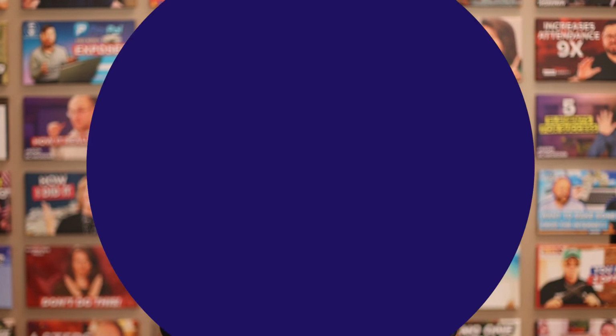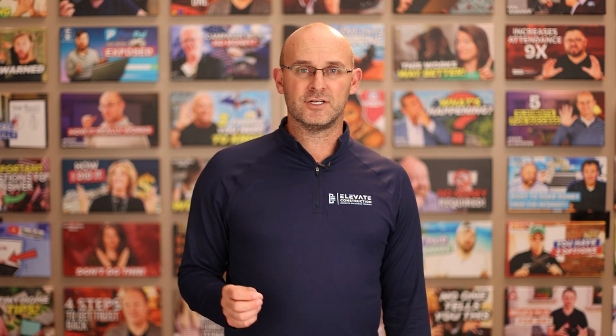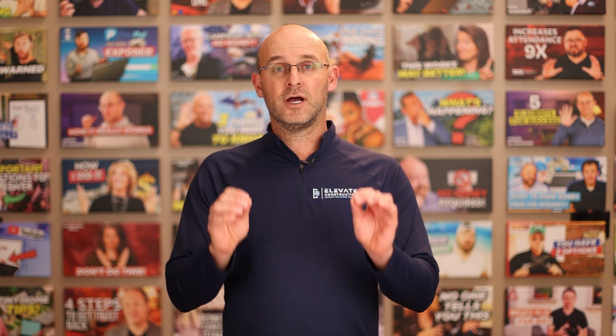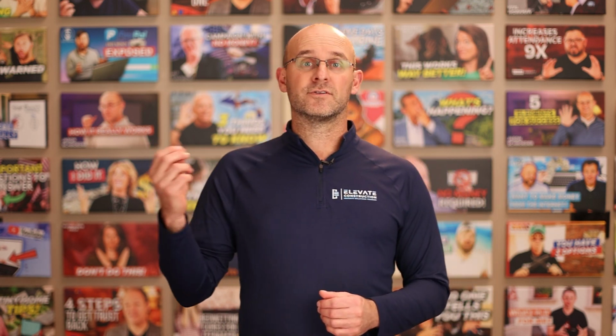In this process, you also have joint decision making. Because you have shared risk and shared reward, you do not have that knife fight again like you have in other contract delivery methods, and you're making joint decisions for what's best for the overall project. We are optimizing for the whole of the project, not individual entities. Like I said before, you enter into a multi-party agreement. Typically it's a tri-party agreement, and stakeholders enter an agreement that outlines the collaborative framework, responsibilities, and the shared risk-reward model. It's designed to align the interests of all parties.